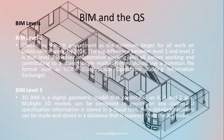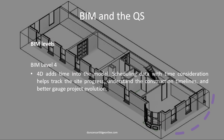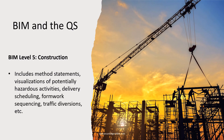BIM Level 2 is an important step-up and reflects the true nature of BIM: collaboration. Level 3 generates a geometric model which can be used to detect design clashes, one of the most important ways to avoid costly and expensive reworking. BIM Level 4 allows for time to be introduced into the model to track site progress. Although BIM Levels are available up to Level 6, Level 5 is the top level used by most contractors, and it introduces the facilities shown on this page.